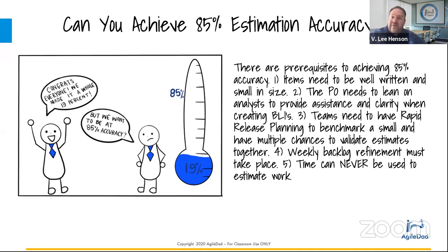And then you walk out of that release planning session, have a chance to review it and refinement, and then have a chance to do a final estimation adjustment at sprint planning. What you're going to quickly discover is that you have a ton of room for you to get those estimates right, that the estimates aren't going to be perfect when you start, but they're certainly going to get better over time.